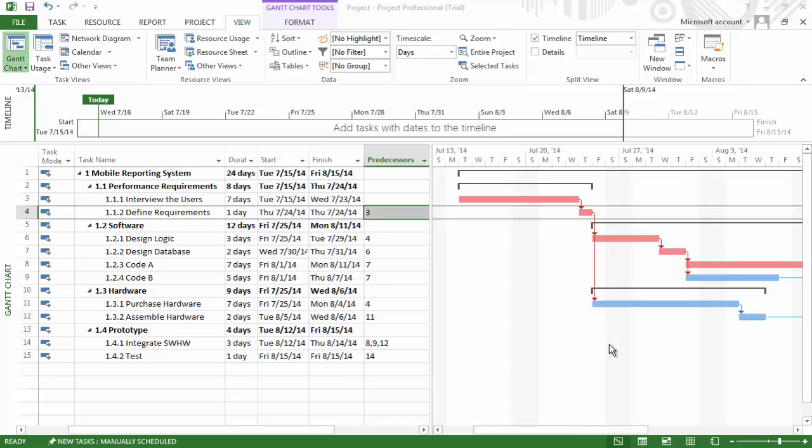When we look at sensitivity, we look at two things. The first is how many critical paths there are in the network. The second is how much slack the non-critical activities have. As a general rule of thumb, the sensitivity increases with the number of critical paths.